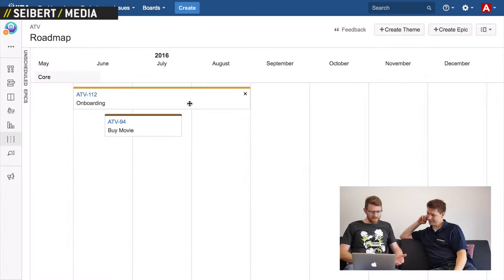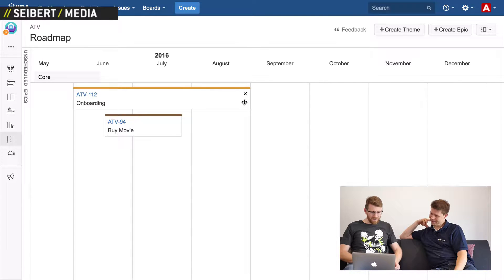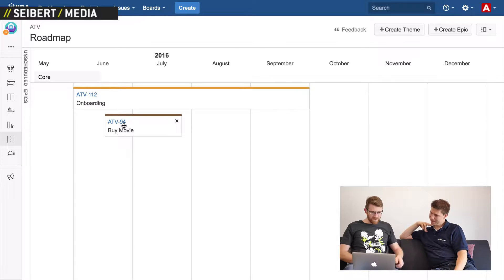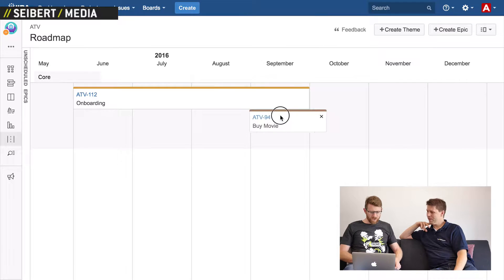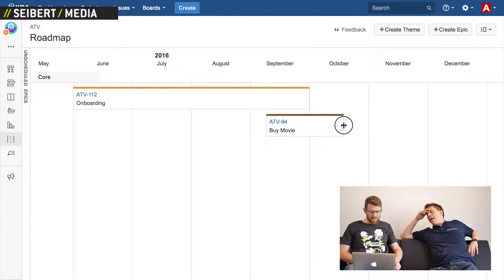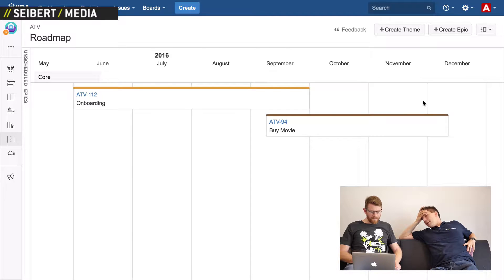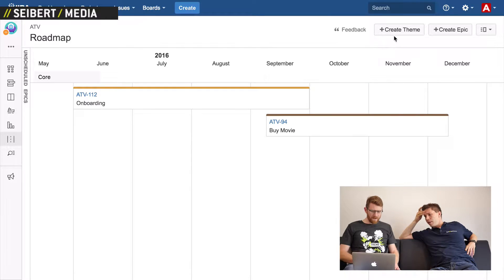The roadmap is not set in stone, right? That's something that makes it agile — that you can change it. Absolutely. If we go and have a look at this, this is a very simple roadmap. We'll stick with the Apple TV example. Let's say I decide to spend a bit more time on onboarding — I can drag that and shuffle out 'buying a movie' until late September. These are epics — the same epics that we looked at on the story map.